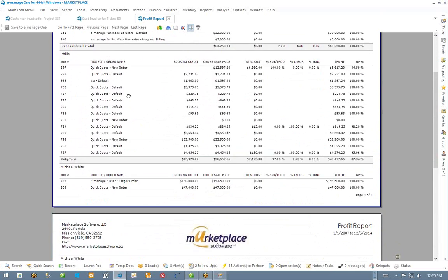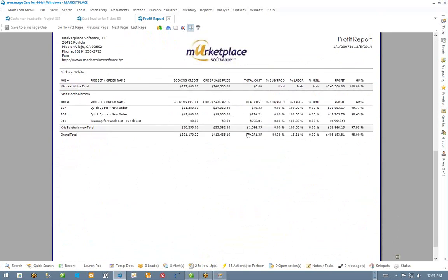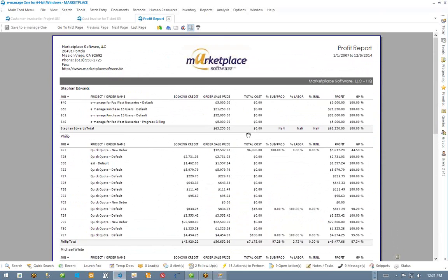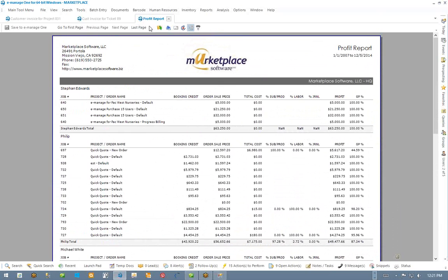we have a video about punch lists that tells how to actually deal with that. What you do is you take your purchase orders and assign them to the order that has value to it, right? Because that's what you want. That should come out of the profit of your order that has a sale price to it. Exactly. When your punch list doesn't, so we don't want to bill the customer for it. Right. But changing the customer order that the purchase order is assigned to will assign the cost to one that has value. You see what I mean? Yeah, I do.